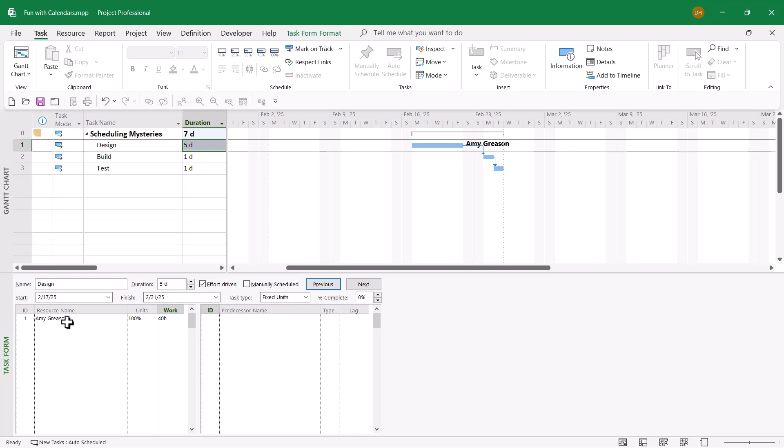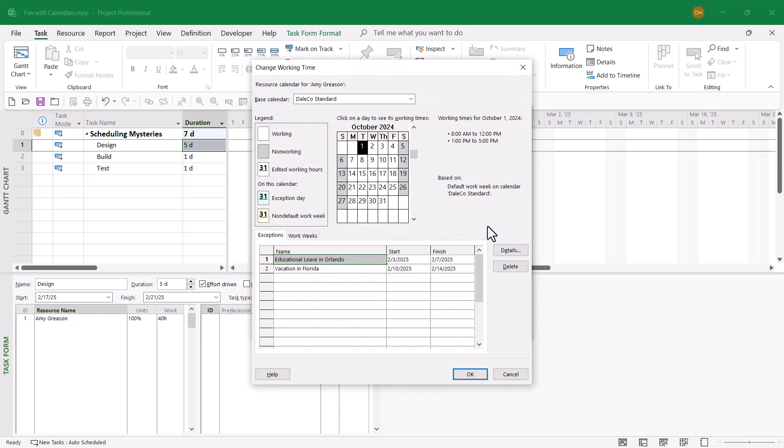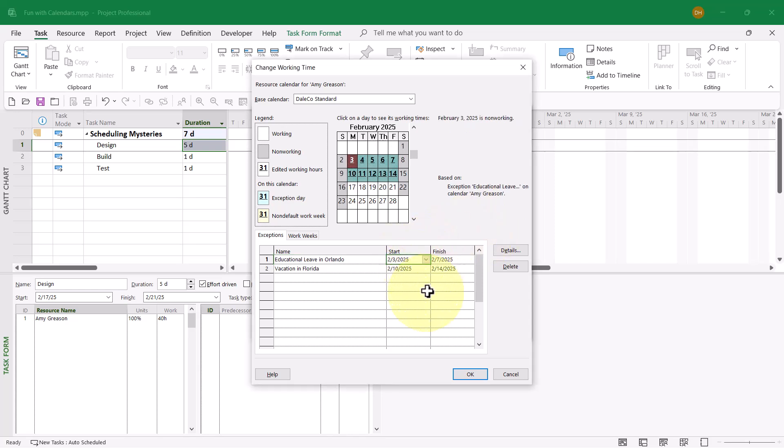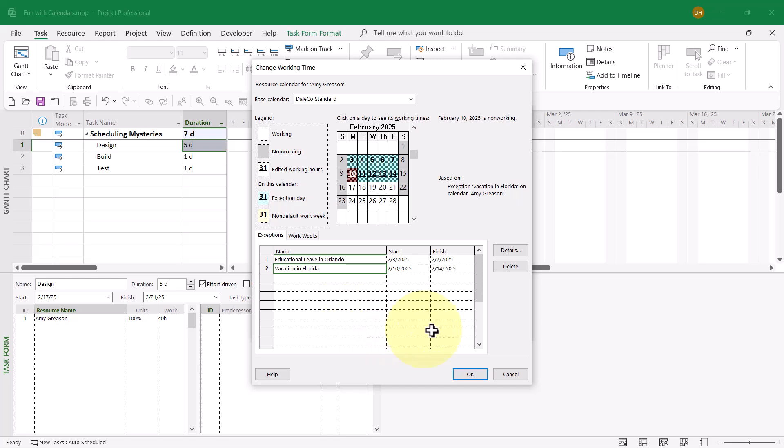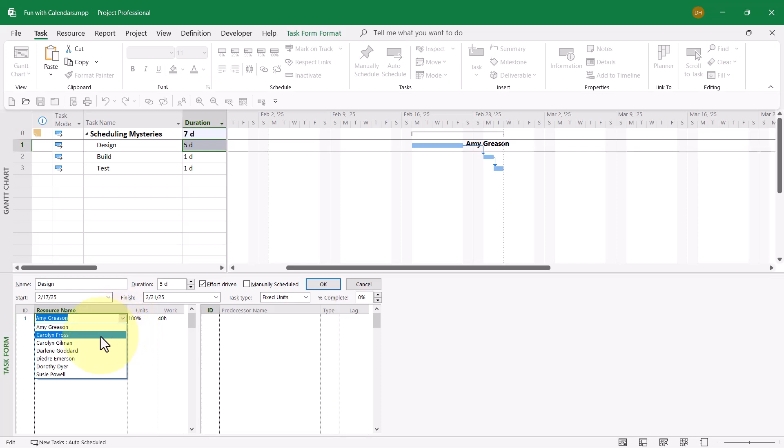I'll double-click the name Amy Greeson and go to the Change Working Time dialog. In the dialog, I can immediately see the source of the scheduling issue. During the week of February 2nd, Amy is going to be on educational leave in Orlando, and in the following week she'll be on vacation in Florida. This schedule won't work in this project, so I'll cancel out and find a replacement, which would be Carolyn Frost.